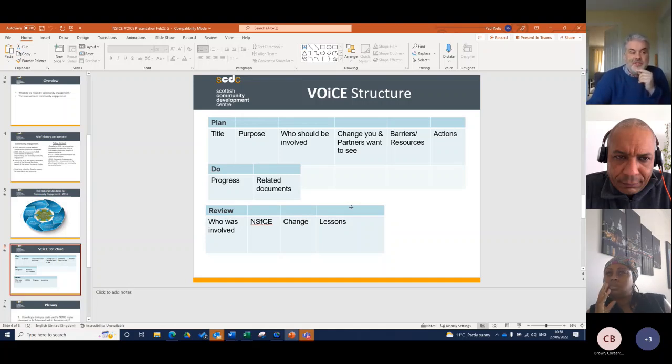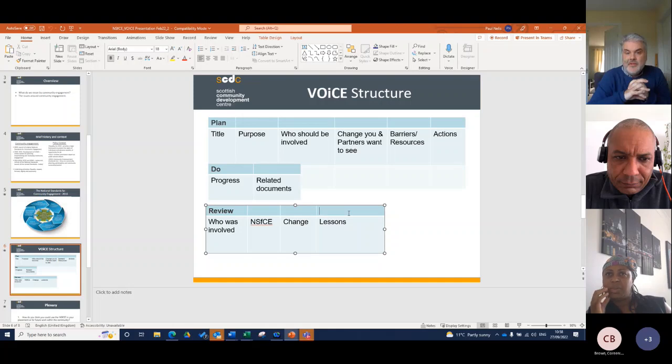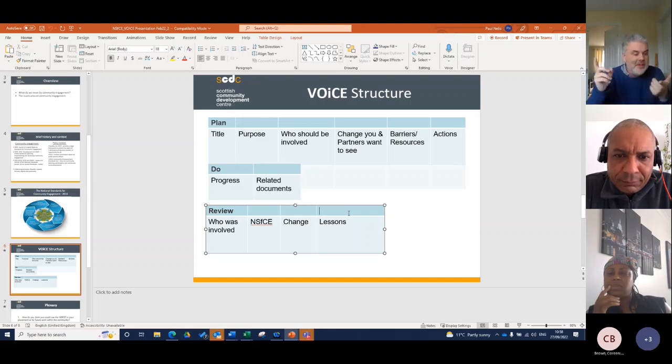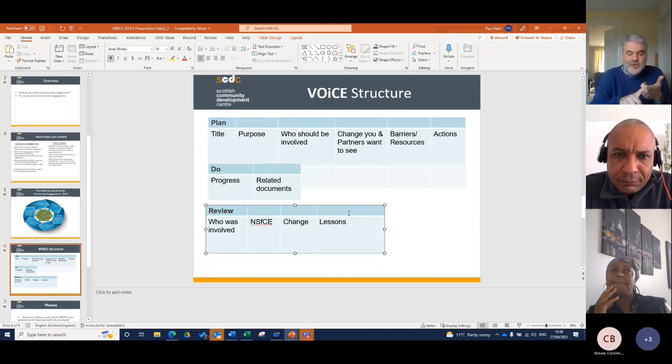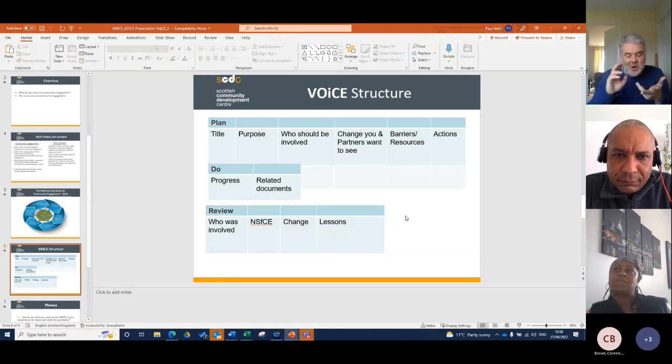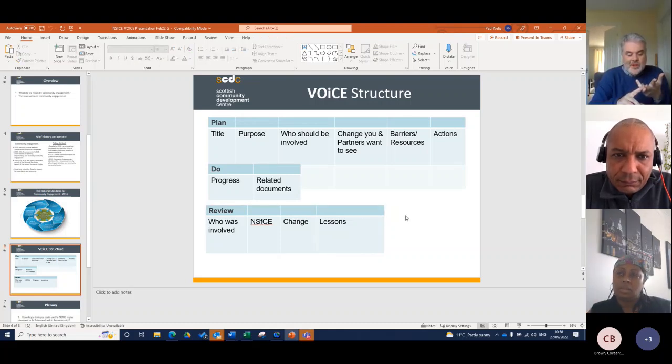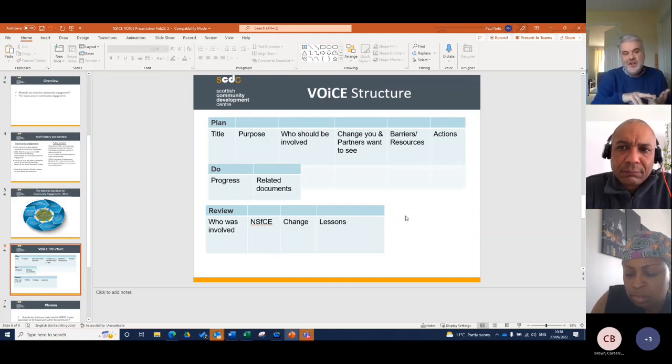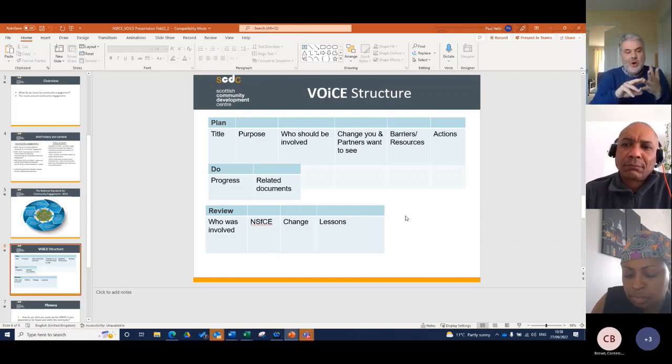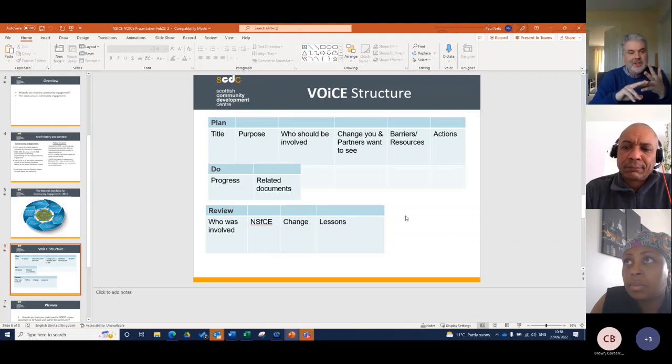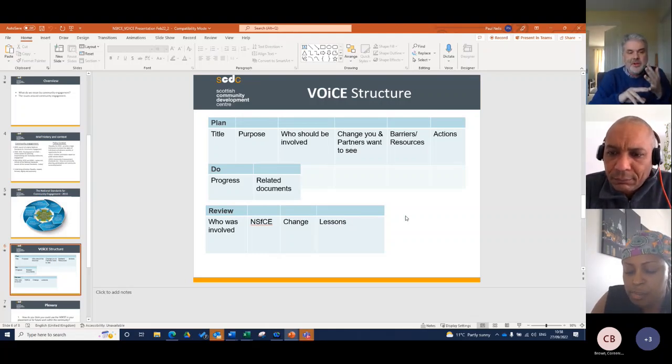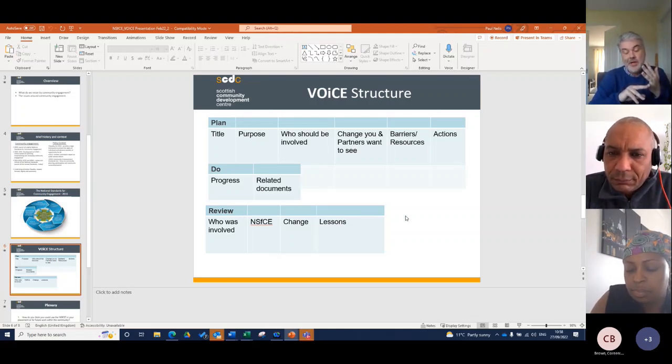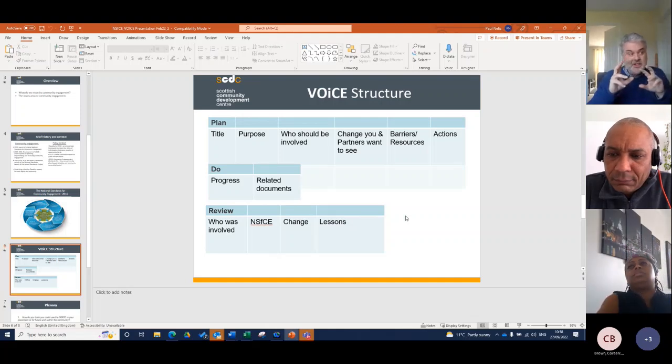And then we recorded some of the lessons that we learned for other team members. It might be that if we're going to do this in the future, don't use the community centre because of X, Y, and Z, or that we didn't include a particular voice that should have been there or the materials maybe could be less complex, or maybe there's a partner that should have been involved in that process. So it's just thinking about some of those key lessons.